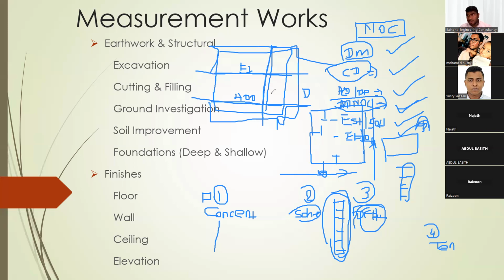Then the authority will come and do a shutdown. Shutdown means they have to prepare an alternative cable here. Then they will shut down and immediately transfer the connection to the new line. This process has to be done in front of the authority representative. The authority will bring their own shutdown people. We cannot cut the connection and shut it down ourselves, otherwise we will get a 100,000 or 200,000 fine. So the shutdown has to be done by the authorities. They are trained to do a shutdown, because you know that power cuts do not happen in this part of the world. Maybe a few seconds, and we will not even know when it happens. So that has to be done along with the NOC.